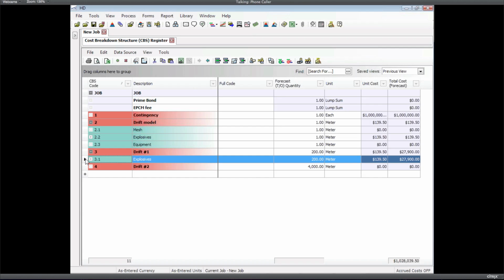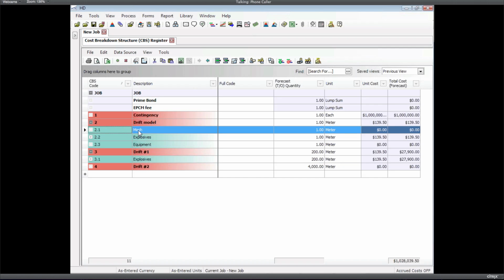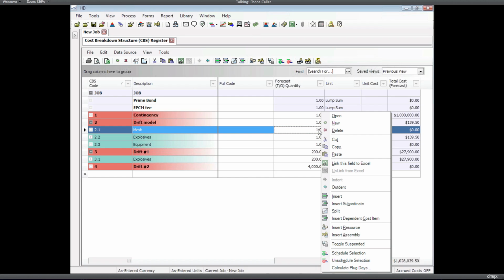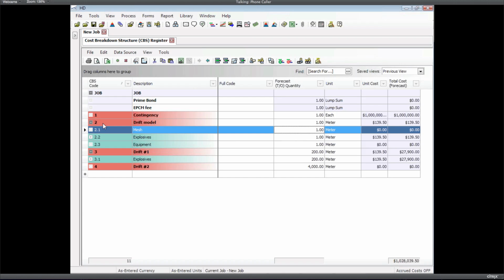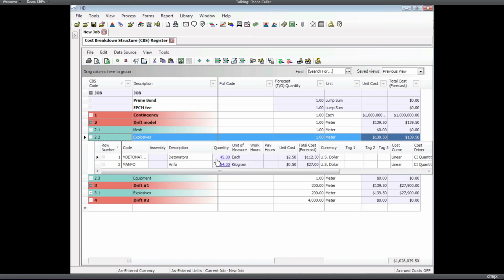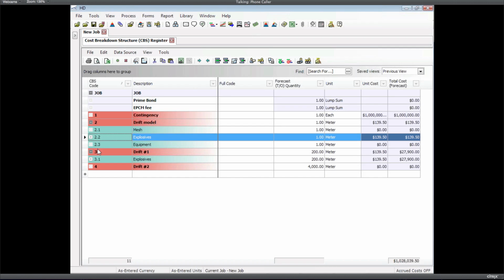Yeah, so it's always going to look one level above. If we had made a link right on cost item 2.1, and that's where we link to Excel, then it's going to look at its superior, which is 2. That's where it would get the prorate. In this case, since we put the resources onto 2.2, the parent is 2.2. Okay, perfect, thank you. That makes perfect sense. That was, again, the right answer.